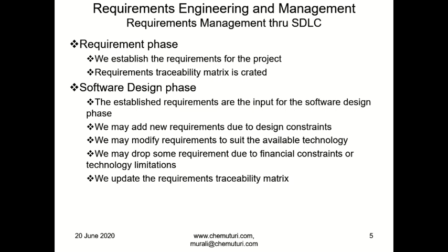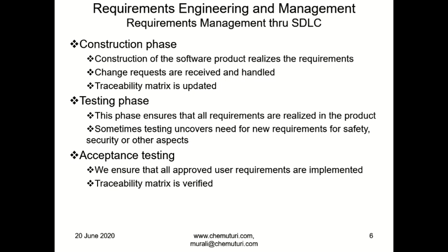And the traceability matrix created in the requirements phase is updated with the new information: additional requirements, modified requirements, deleted requirements, postponed requirements. We update that and also show the pointers to the requirements which have been designed in the design artifacts. That is what we do.